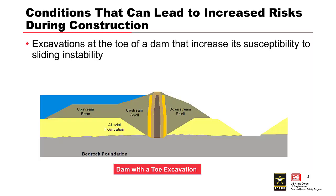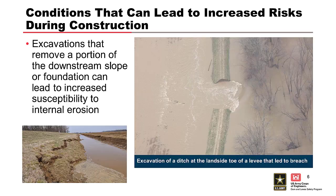Another condition is excavation at the toe of a dam or levee that can increase the likelihood of slope instability. Excavations at the toe of dams and levees can also increase the susceptibility to internal erosion. For this particular project, a ditch was excavated at the landside toe of a levee that provided an unfiltered horizontal exit for backward erosion piping to occur, which eventually led to the breach of the levee.